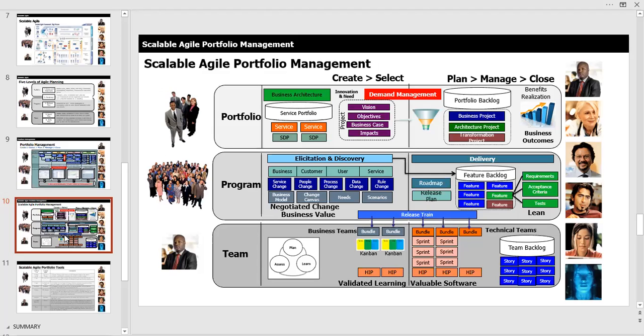In the project estimating, I showed you how there were 3 phases of planning. Discovery, so here you see the word elicitation and discovery. So that's the rough order of magnitude planning. Then there was the planning phase, which we got into. And so I said under discovery, we used expert judgment and planning poker, and then we transitioned into what we call the iterative planning phase, where we talked about a more detailed version of your roadmap that would fill up your backlog, or cloned records of a previous project that would fill up your backlog.